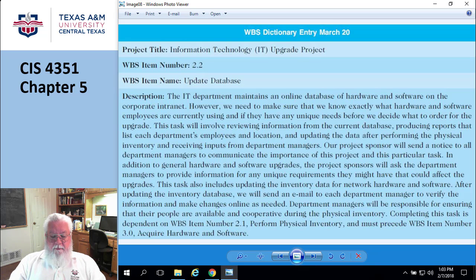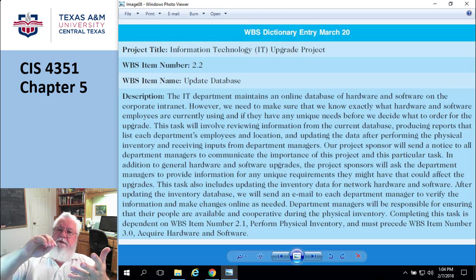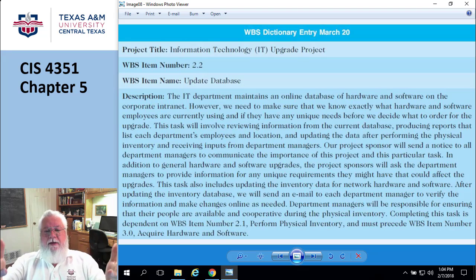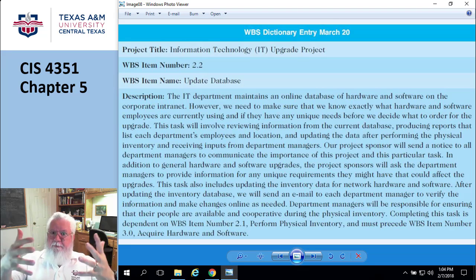All right, so it could be misused. And the other one is one of the tasks you need to do is allocate the resources for making changes. You don't want to say, well, okay, here's how much time we have in the schedule for doing all these pieces, and then not even think about the time and energy it takes to process changes. In the budget, you need to have time for somebody to go over the change requests and approve them and put them in the database. These things are not free. So don't just ignore change management when putting your budget together. It's a vital part. So you need to have that built in.